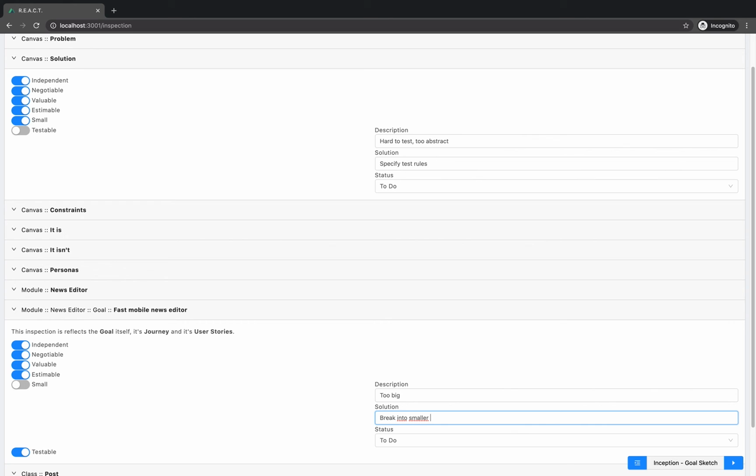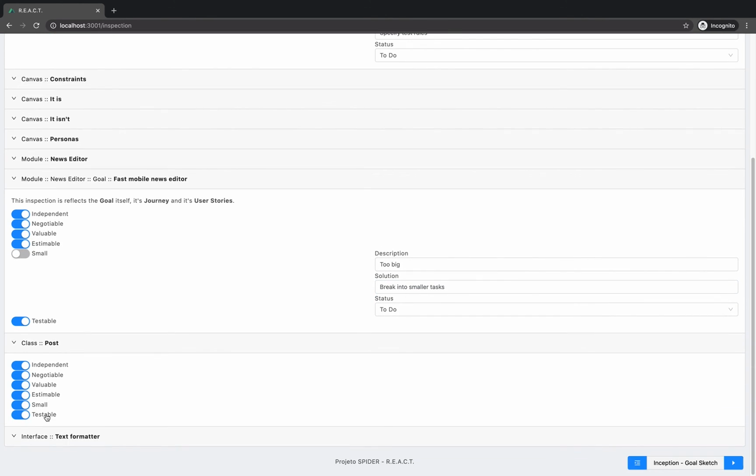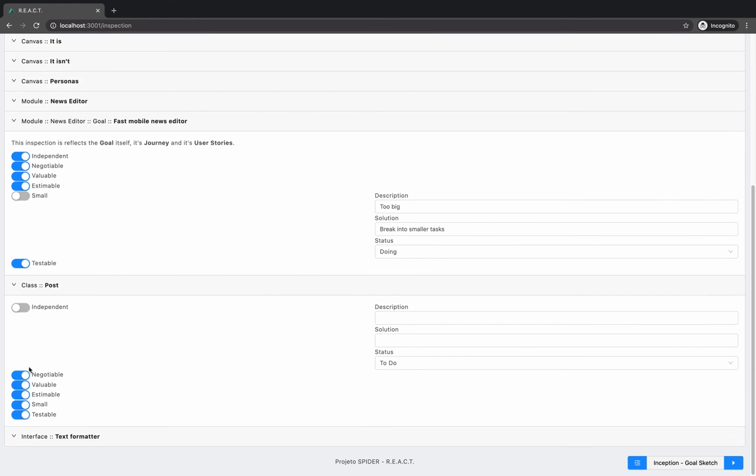Thus, a work product containing an inconsistency criteria is reported as a card in an inconsistency backlog so that it can be addressed. Using the Kanban canvas, the inspection backlog makes it possible for the team to demonstrate what needs to be worked on to improve the work product generated based on their status. Concomitantly with Scrum, to do, doing, and done are defined.